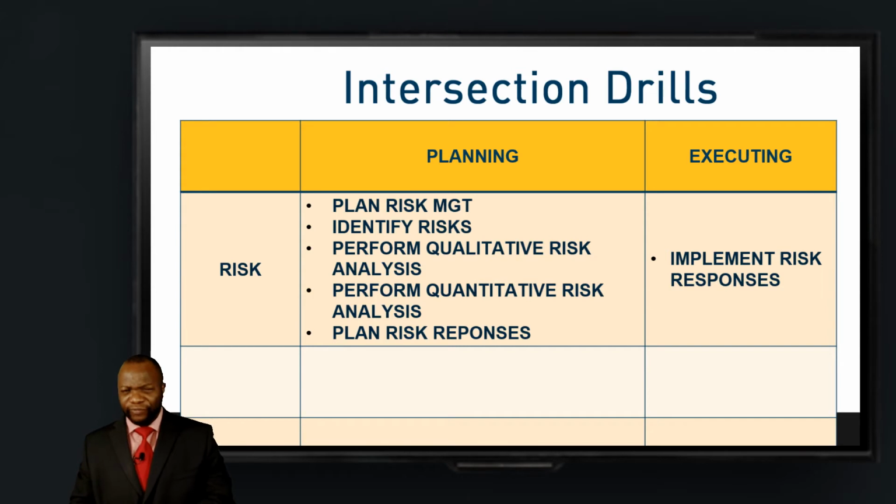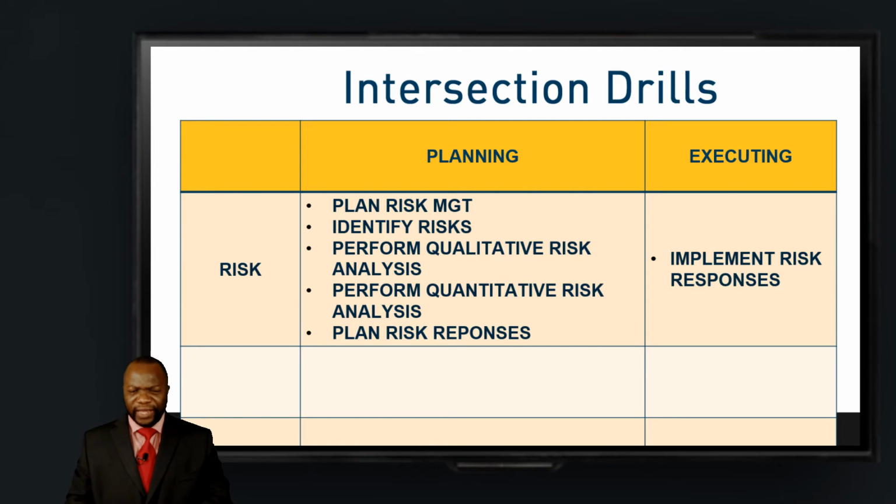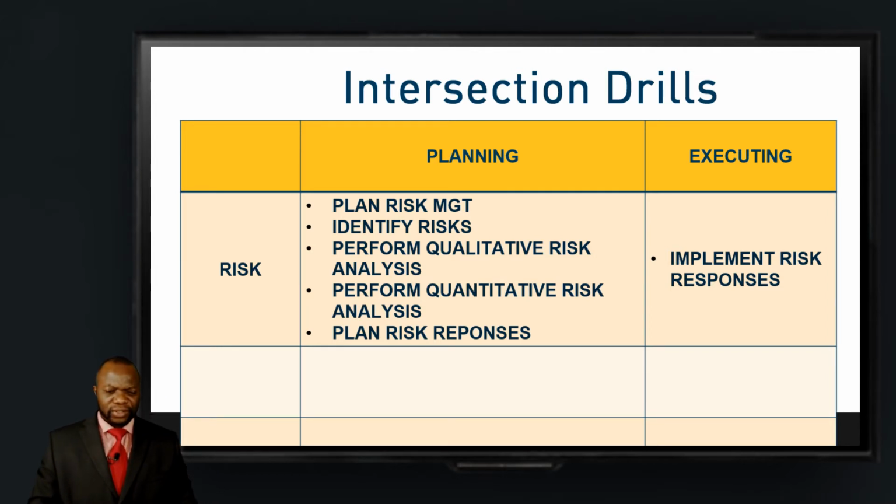It looks at the aggregate effect of risks on the project, and it also looks at the numeric values from a currency standpoint. Some firms choose to do it by resource hours, but you're looking for the aggregate effect of risks on the project. You're trying to get an understanding of that numerically using absolute probability and impact in dollars or something else.